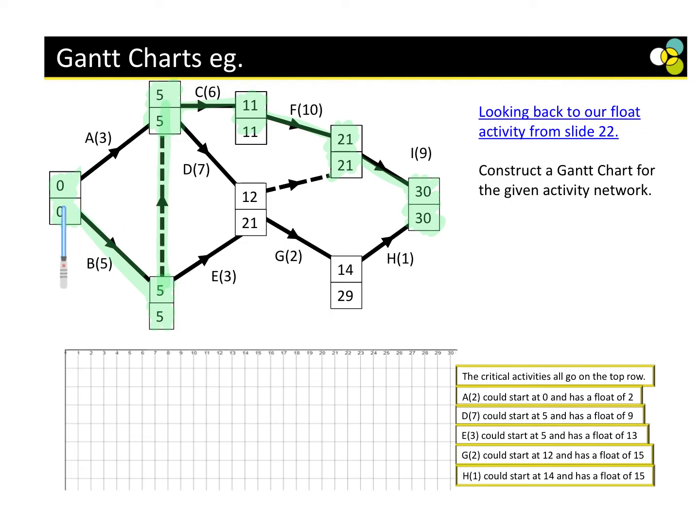So this is actually the whole of B. Taking a quick look. Yeah? So our critical path, this is where we get the most mistakes. Make sure you know that your critical path only contains critical activities with a total float of 0. Do you see how easy it was to make that mistake? That's why I did it that way, to show you guys, because everyone always looks to A first, don't they? Let's face it. Right, so our critical activities are B, C, F, I.